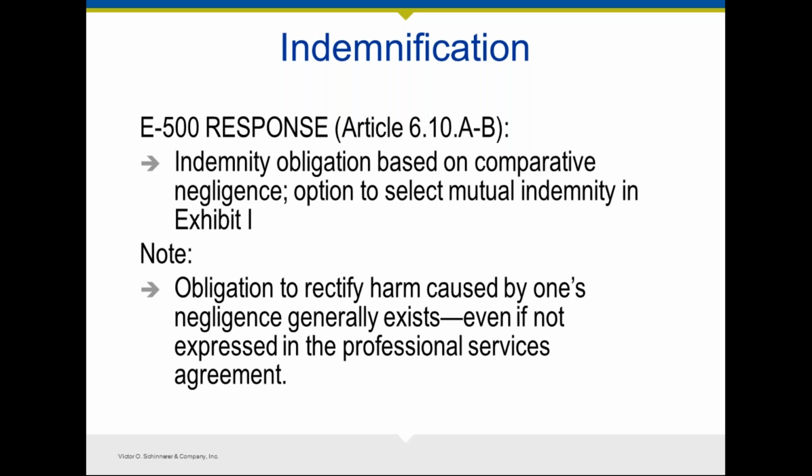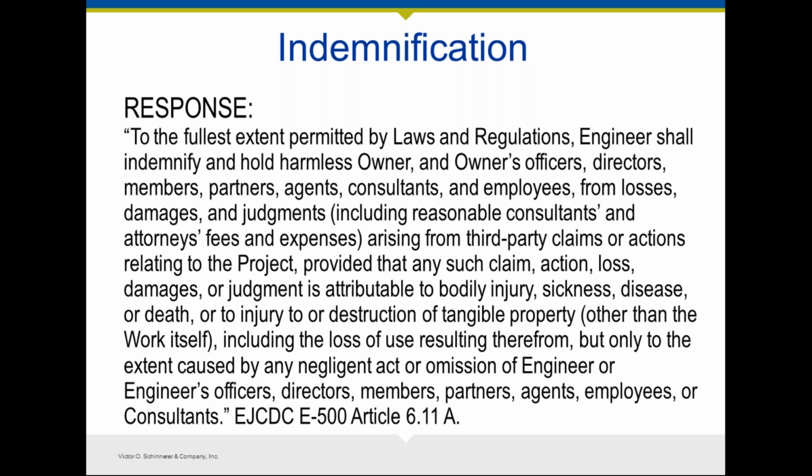And as we see in the following two slides, these are the suggestions that the EJCDC and the AIA documents have suggested as responding to your indemnity obligations. Generally, you want to make sure that it's triggered by your negligence. It is based on comparative negligence concept, and amend it as best as you can.